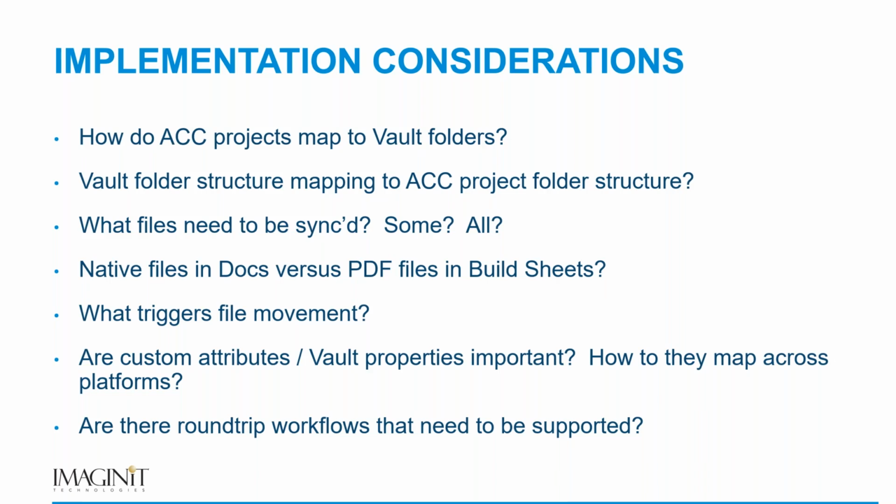In a lot of cases, especially this particular client, they only send PDFs. They don't want files to conceivably be edited, although I know that you can prevent that in the Construction Cloud. They didn't even want to take that risk. They're just sending PDFs. Are we sending the files to Docs, the doc side of the Construction Cloud under files, or are we turning them into sheets? Right, I kind of show both ways just to show that we can accommodate either. However, more often than not, it's probably one or the other there.